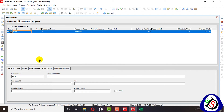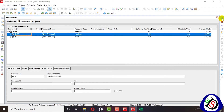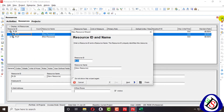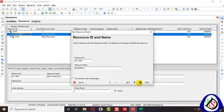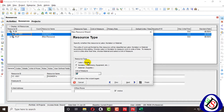The first step is to add a resource. When I click the add button, a resource ID and name field appear at the top. Enter the resource ID or resource name — the resource ID must uniquely identify this resource. Resource ID should be villa construction 0001, and my first resource name should be engineers. I will create this one as a labor resource, then go to next.